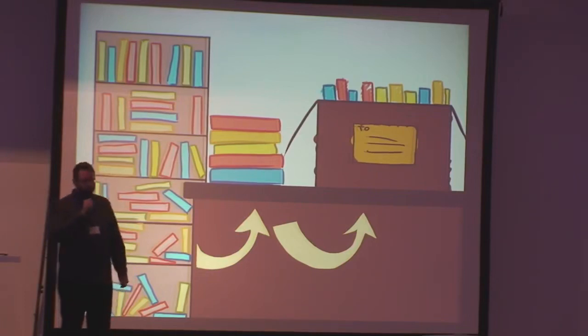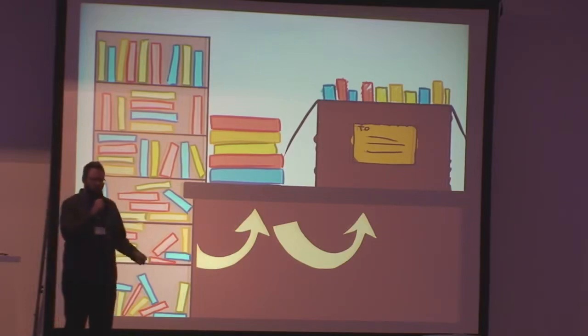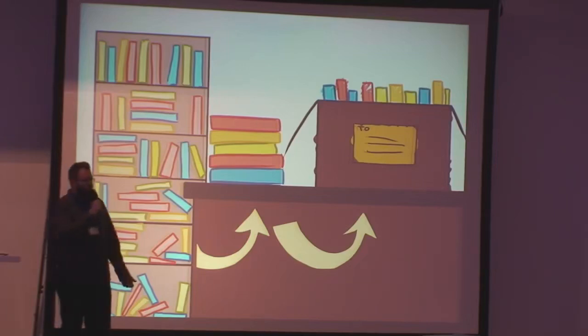And ideally, it should be prioritized and well-groomed. What that means is it should be ordered with the most valuable work to be done at the top, which should also be nice and structured and well planned out so that a development team could work on this, on a moment's notice.